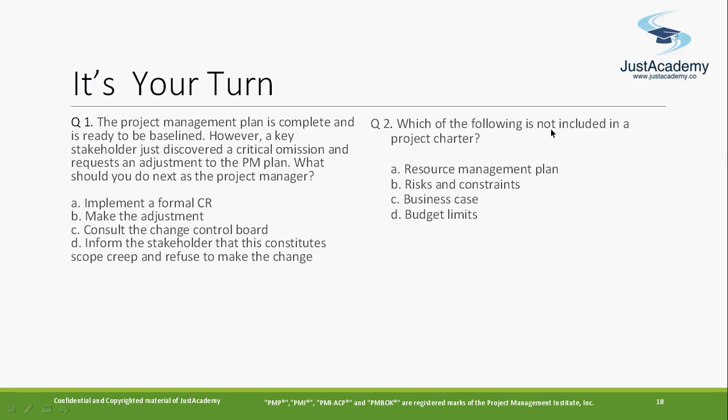First of all, which of the following is not included in the project charter? Business case has to be there in the project charter. Budget, it has to give some budget. It has to have some risk and constraints, right? Resource management plan, you don't know how many resources are needed because you don't have a plan yet. Resource management comes from the planning process group, but the project charter comes from the initiating process group. So this doesn't fit, right? Is this clear?